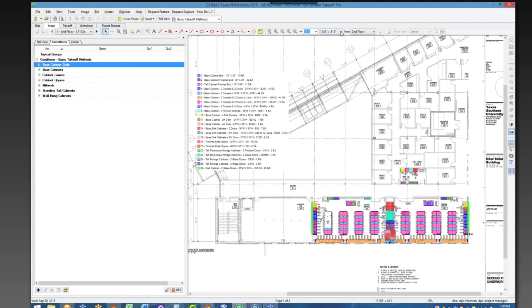And then, of course, up here at the very top, we have the drop-down menu that allows us to choose scale. So obviously, scale is very important. If the scale's off, we get the job and then we lose a bunch of money. At least that's how I used to find it in my day. So here we're able to set scale, and if scale is off, we have the ability to calibrate the program to pick up that scale by known linear dimensions on the plan pages. We can quickly be accurate at all times.